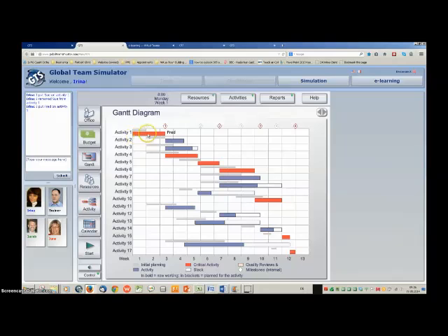But we find the activity takes longer than planned, maybe because it's a two-person activity or something like that. And the knock-on effect that adjusts the critical path actually shows up all the way across. And you can see already that the program is likely to take 12 weeks.